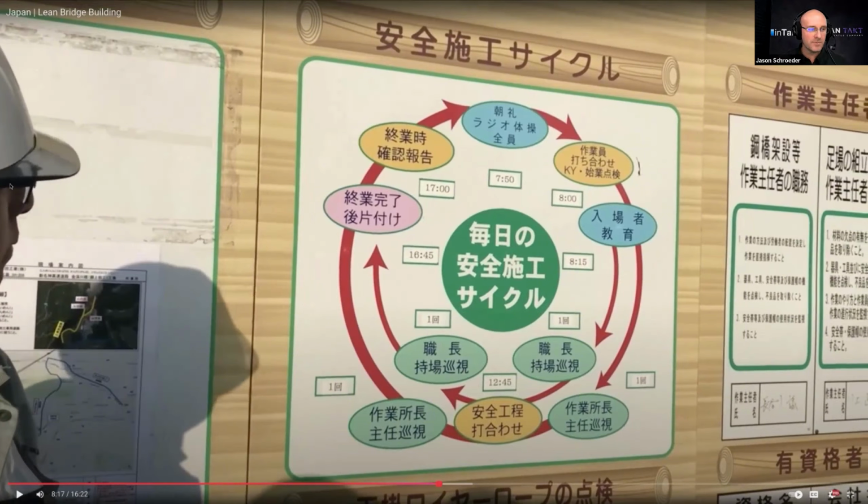Okay, this was probably one of the most validating things for me because what Kevin and I get teased about most in our systems is people arguing about the meeting system. If you noticed, and this construction is based off of the Toyota production system, one of the most effective systems in the world, they have their afternoon foreman huddle at 12:45. That's where, and I just typed that in there, hopefully you can see it a little bit, that's where they plan for the next day.